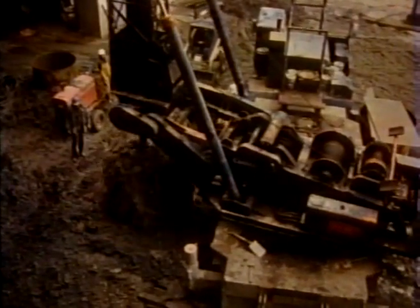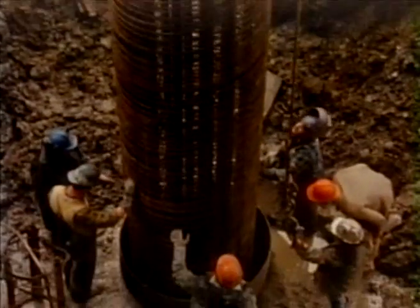Work began with the rehabilitation of the old passenger ship pier. Built in the 1920s, it delivered visitors into the very heart of the city. And now the ships will return to Canada Place. Site preparation required that 200 large steel caissons be drilled through the pier into bedrock and filled with concrete. Another 700 concrete pilings were positioned before work continued on footings and slabs and below-grade surfaces.